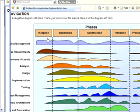Phase 1, Inception. This is the first phase of the project lifecycle. The major goal of this phase is to achieve concurrence among all stakeholders. It's just an agreement phase. So here you would get your kickoff, your high level business requirements, and what would be the initial project plan.